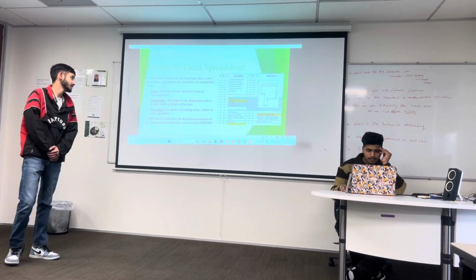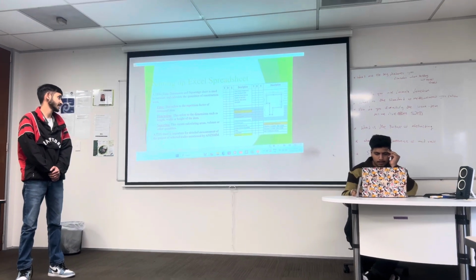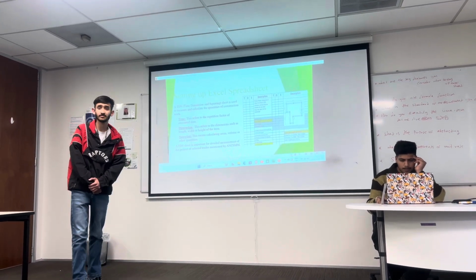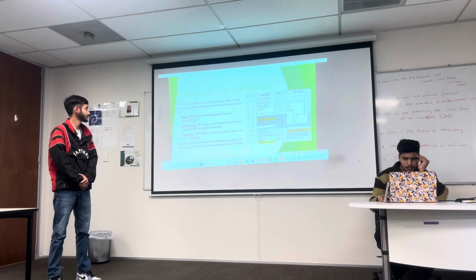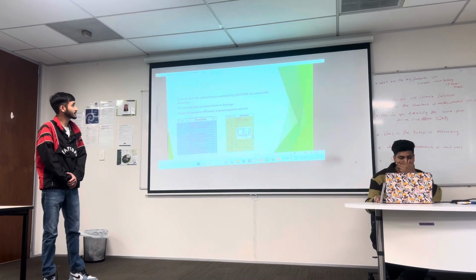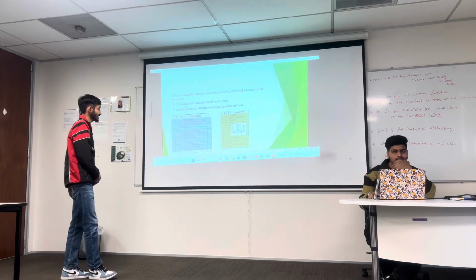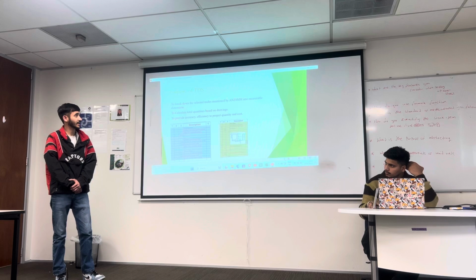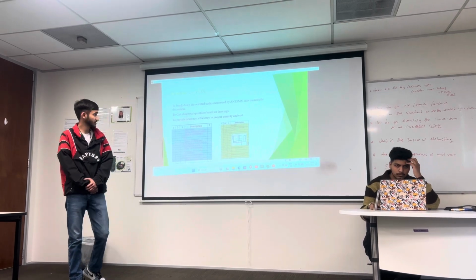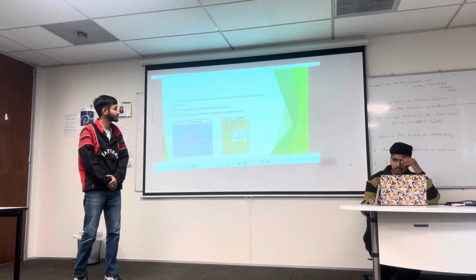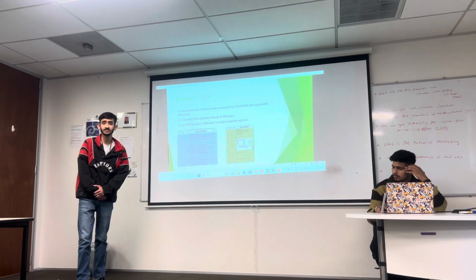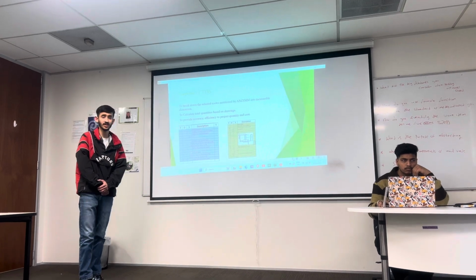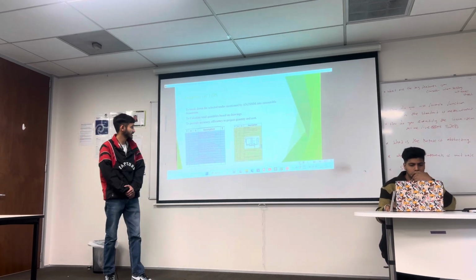A TDS sheet is important for detailed measurement of the project of selected trades mentioned by ANZ SMM, which is the Australia New Zealand Standard Method of Measurement. What is the purpose of TDS? TDS has three main purposes: to break down the selected trades mentioned by ANZ SMM into measurable dimensions, to calculate total quantities based on the drawings or specifications we have been given, and to provide accuracy and efficiency to project quantity and cost. Here is an example of the TDS sheet.